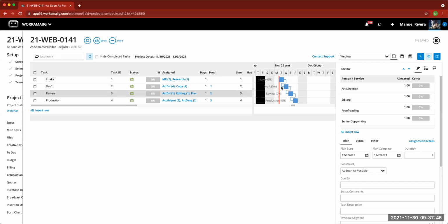Now, because this is a computer, we're asking it to be very literal. I allude to it more as a mathematical equation, right? There's the computation on the left side of the equal sign, and then the answer on the right side of the equal sign, if you're reading from left to right. And that's really what this is. Oh, okay, well, we have these tasks that exist within a day frame that are going to be following each other. There's instructions on the dependency or predecessor column that says, line 2 follows after line 1, line 3 follows after line 2, etc. Right?